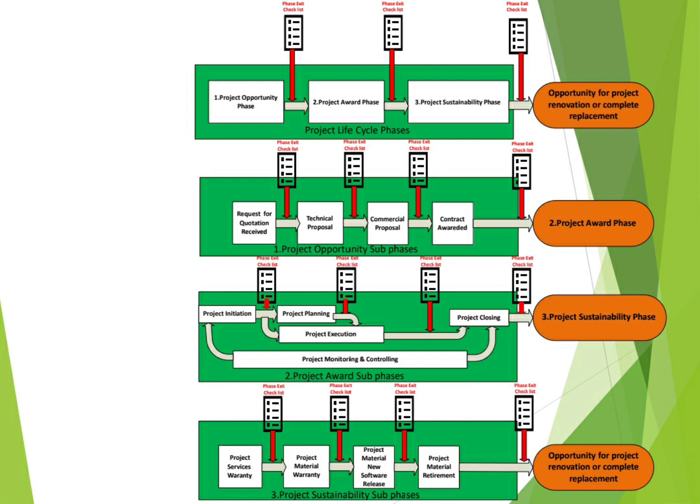You need to go through the contract, take some snapshots from the contract related to any milestone dates, payment terms, penalty clause, and put it in one Word file. And all stakeholders inside this internal kickoff meeting need to discuss and agree. And finally, there will be a list of action items to be prepared. Also during this, if there is any commitment which is not shown in the contract but there is pre-bid, any agreements, any minutes of meetings that your company agreed, you need also to have all of this.